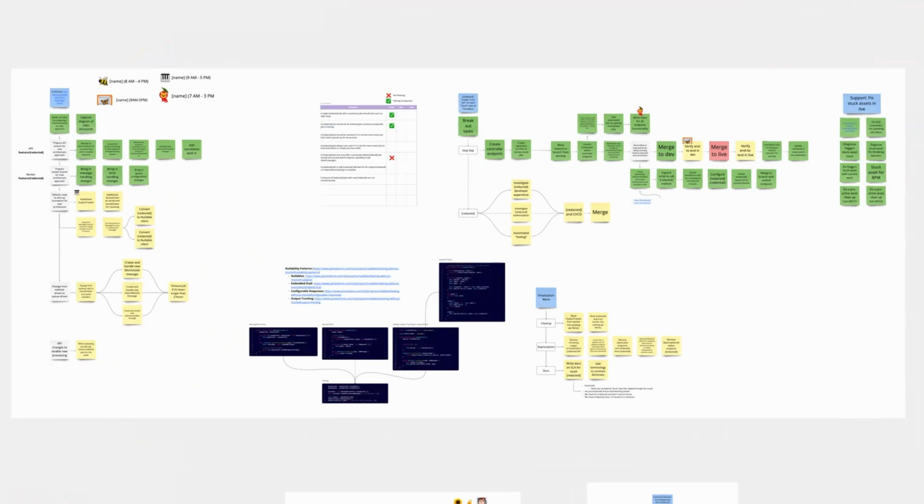When a team is ready to start, or when the valuable increment is ready to be started, a product manager will steward a team to get that work going. And the initial team is going to include a product manager, often a UX designer. If you've got QA, then presumably a QA person to start shifting left to think about what we are going to look at to define success. And it will also include several engineers who will get the work started.